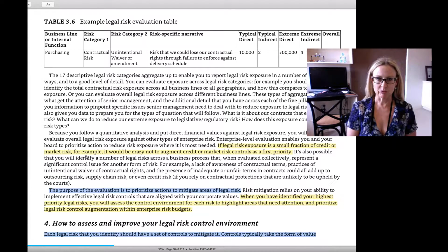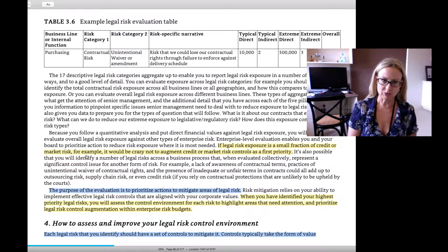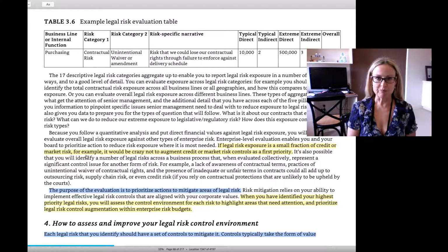So looking at table 3.6, you've got your identified risks there on the left-hand side, moving from their most general description to drilling down and setting out exactly how that risk might eventuate and what the consequences would be. And then what they've done is they've entered that hard data that Matthew Whaley likes to play with, and they're saying, well, what's our financial losses of this happening? They're of the order of £10,000.